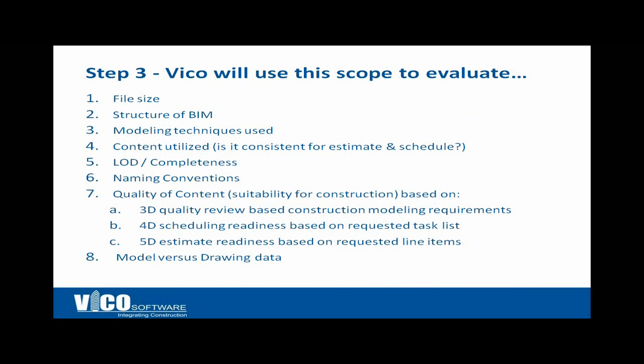We'll take the model, the drawings, and the contract and start to run through our checklist, looking at the files, the structure, modeling techniques, whether content is consistent, whether names are helpful, the completeness of the systems, how the models are organized, and the quality of the content or its suitability for use downstream.